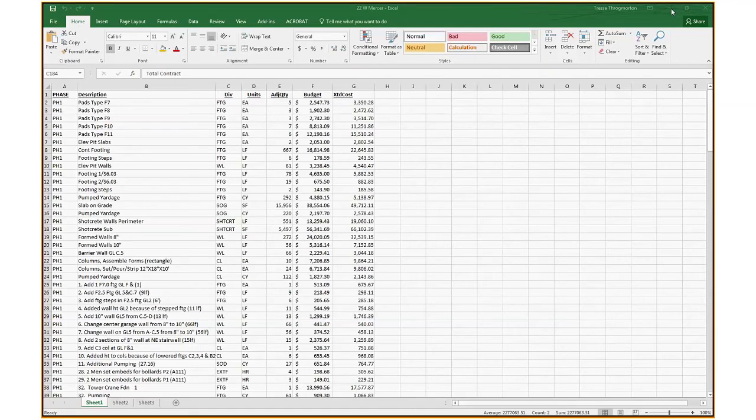First off, the schedule of values process begins with the estimator who bid the project, and after the project has been awarded from the general contractor, once the budgets are finalized, the schedule of values can then be created.